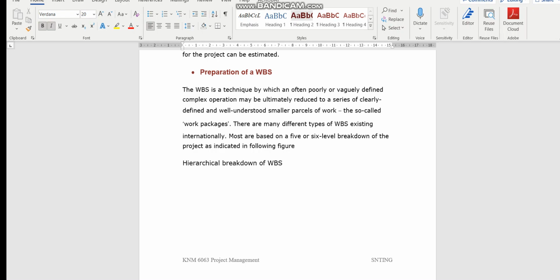It's just like when you're doing a school, you have a canteen building, that school classroom building, the library building, the infrastructure, these are all subcomponents. These are not work packages. So when you go into and write the work breakdown structure, it's about the physical work. It's about the step-by-step activities that you need to do in order to do the job, you see, to finish up the job. So it's about work package.